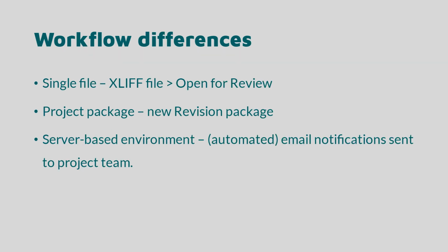Management tasks and workflow processes will differ in localization depending on the chosen method for sending out and receiving the project files. If the project manager has chosen the single file approach, then the single XLIF file will be received back from the translator and re-imported into the CAT tool. The project manager will check that all the translations have been confirmed so that the software can close down the translation process and reopen the XLIF file for the review process. Once the document has been opened as a review file, it can then be forwarded to the assigned reviser.